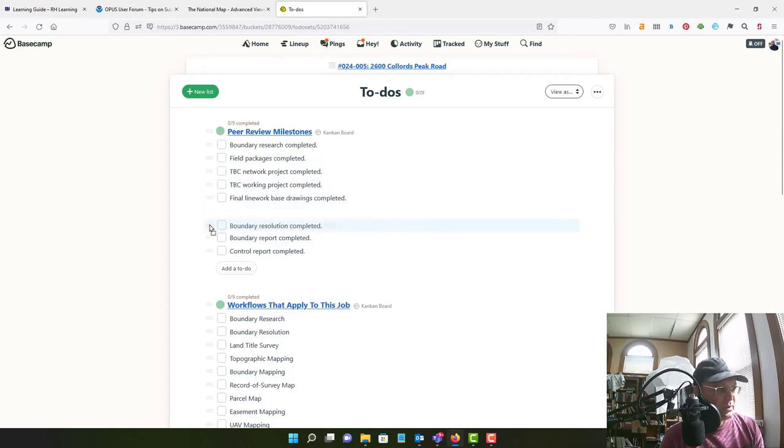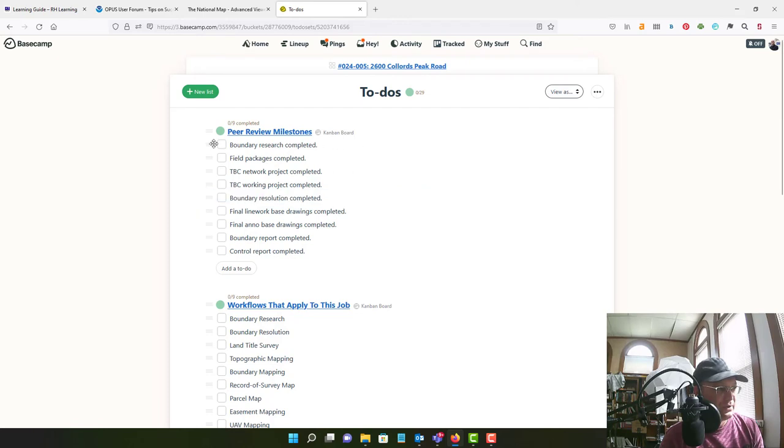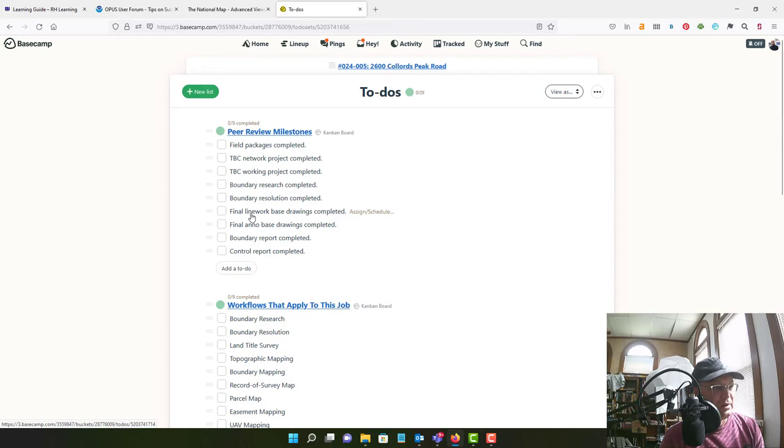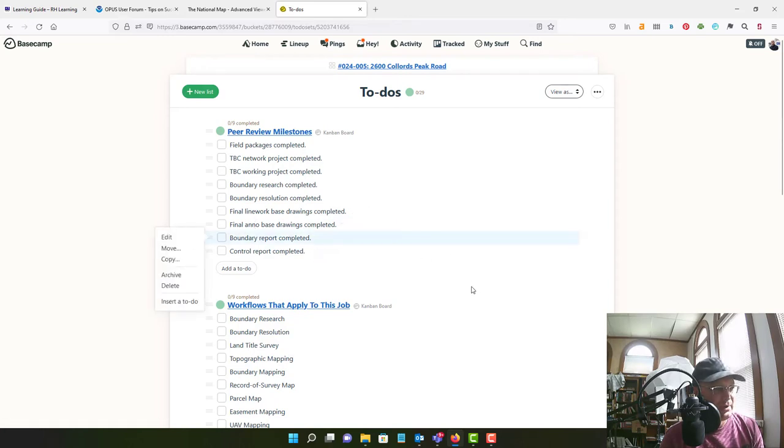Okay, so the field work comes first. Then we do the boundary research, boundary resolution, line work and Anno drawings. Okay, then we'll do our boundary report and our control report.